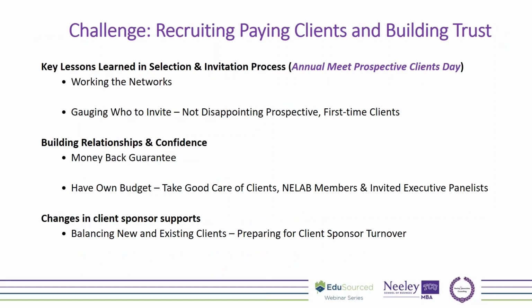Going back to the recruiting and just building trust, some key lessons learned in the selection and invitation process. The first year, what I did was I invited more prospective clients. And of course, I didn't have a pool of second years that could work on ad hoc projects. I had two prospective clients I invited, and there weren't enough students around to serve them. I had to deal with people that were disappointed, and lesson learned. But that gets back to, every year, working to balance and understand supply and demand.